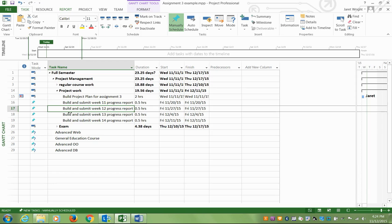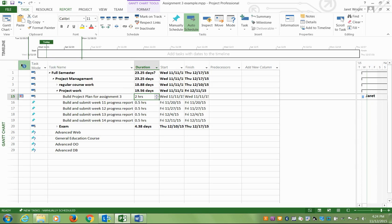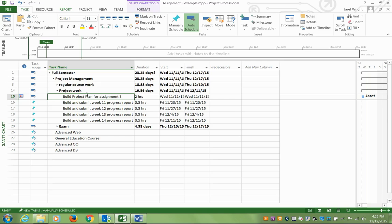In the case of this project, I said I have to build the project plan, which is the document we're currently looking at. And I said you could probably do that in two or three hours. If I hover over this, it says this task has a finish no later than constraint. So it's auto-scheduled, which means I can do it whenever I have slack, but it must be done by the 19th, because that's when it's due.